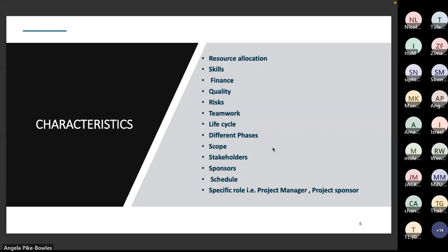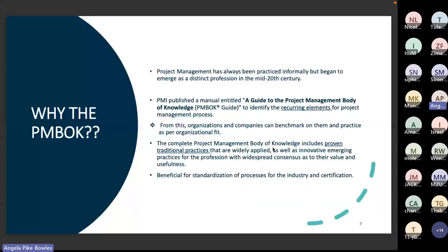And it all starts with the construction program, which we'll talk about at a later stage in our unit. The construction program is going to indicate how many weeks the project is going to take, what activity is going to be executed within specific weeks, similar to this course.